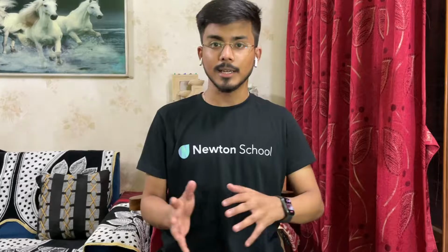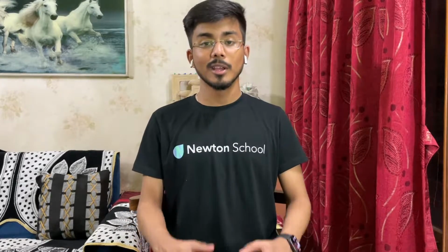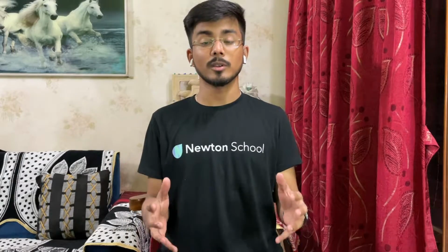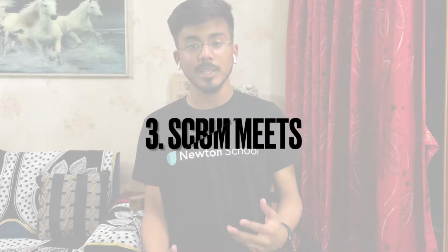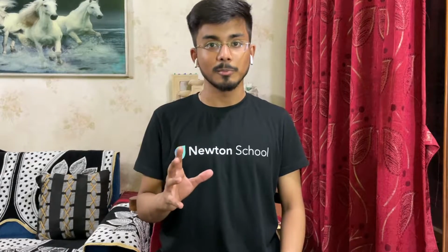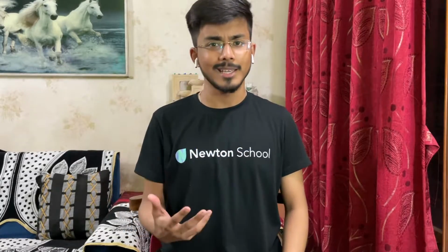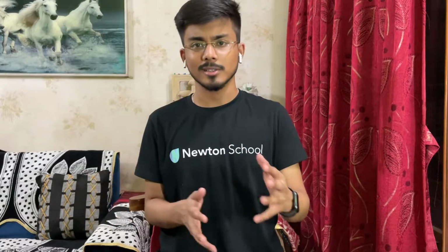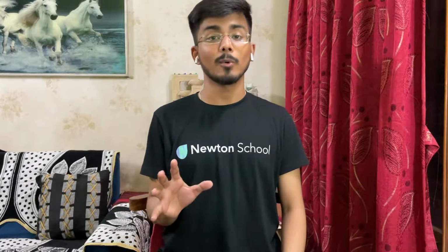And after that, let's jump into the third point, which is very much important, because if you are doing your work remotely, then your communication should be good. So for improving the communication, you should do Scrum meetings. You should meet at least 5 minutes a day, every day, and just discuss your updates, what you did today and what you will be doing tomorrow. And if you have any blockers, then you should discuss them in the meet. Or if you want any kind of guidance, then you can approach your mentors and seek help from them, so that your project won't get delayed.